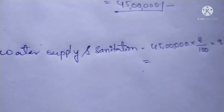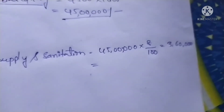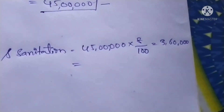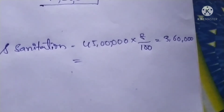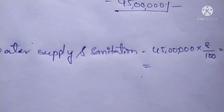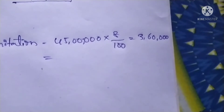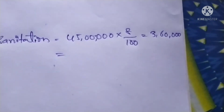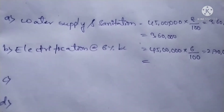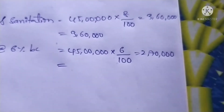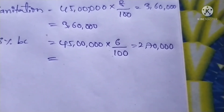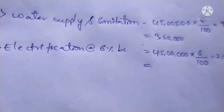Now I am going to calculate the provisions. Water supply and sanitation is 8% of building cost: 45 lakhs into 8 divided by 100 equals 3 lakhs 60 thousand rupees for water supply and sanitation cost. Electrification charges is 6% of building cost: 45 lakhs into 6 divided by 100 equals 2 lakhs 70 thousand rupees for electrification charges.